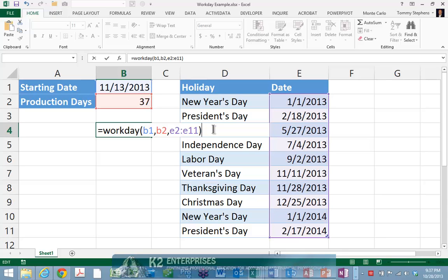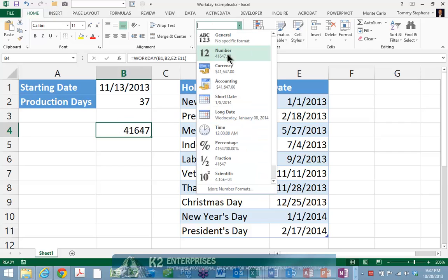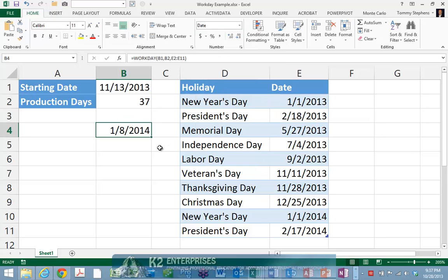In this formula, the reference to B1 is the starting date, the reference to B2 is the number of production days, and the reference to cells E2 through E11 represents the holidays that your company recognizes. Upon pressing Enter and formatting cell B4 to a date format, we find that the projected completion date of this project is January 8, 2014.